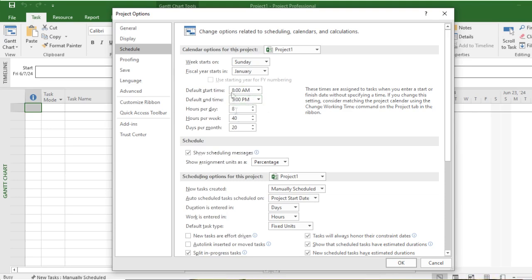So the in-between time is 9 hours, but hours per day is declared as 8 hours because as a standard norm, 1 hour is kept for lunch and tiffin or something. So the total working hour is 8 hours, whereas for 8 hours of work in a standard shift, 9 hours are occupied.